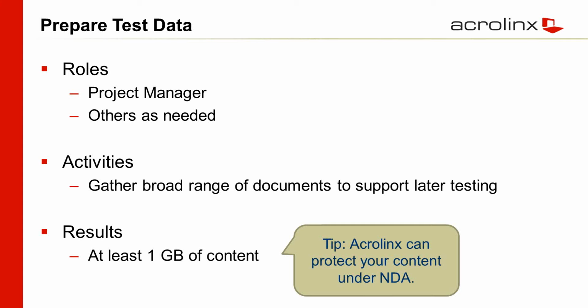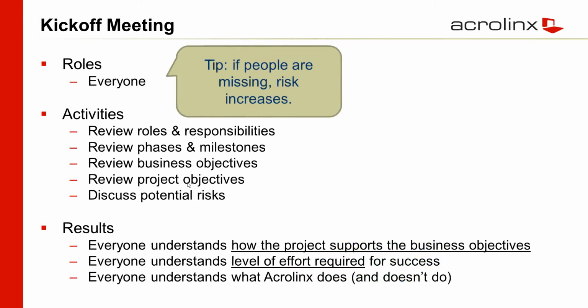Obviously, in smaller organizations, it might be harder to get to, but that's what we're aiming for: a broad range of content that can support both the initial testing that we do, as well as the later testing as we go through stages of this project. It's critical for us to have this. We've certainly seen lots of implementations where this becomes a bottleneck, where it takes time, and not planning ahead for this can mean extra time cost in the process.